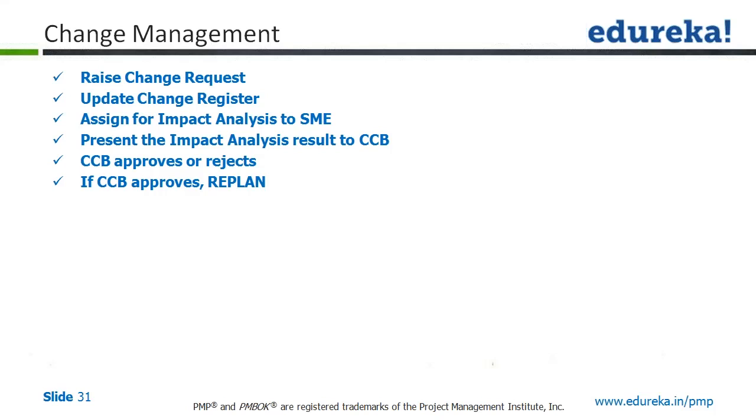And just think for a while that you had initiated a change request. Maybe you realize that for some unforeseen reasons, the project is currently running late by 2 months. You had raised that concern to the change control board with all the justifications and all the impact, and you realize that by putting in extra efforts and expediting various activities, the best you can do is mitigate only about 1 month out of that 2 months lag, even if you put in additional manpower.